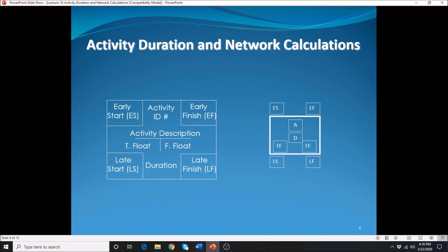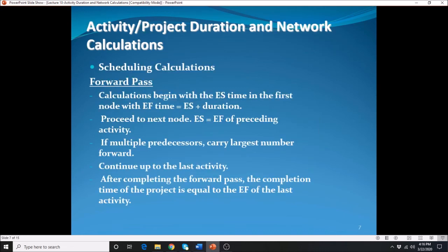And again, in the previous lesson, you've learned how to draw the network diagram. When you draw the network diagram, there are several things you need to keep in mind. You need to draw the network diagram from left to right, top to bottom, in alphabetical sequence. Anyway, I'm going to show it to you as we move on into the calculations.